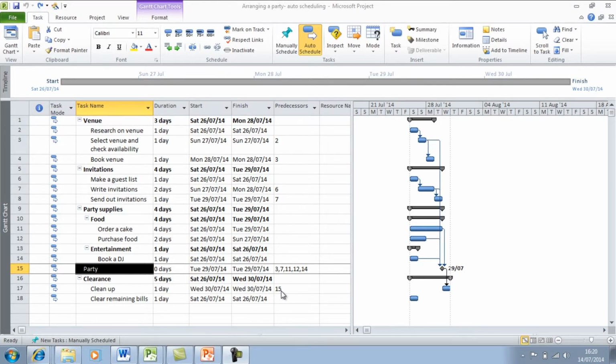There's a flexible constraint, which is where Project can change the start and end date of tasks. There's inflexible constraints, where a task must start and finish on a particular date. Or there's a semi-flexible constraint, where a project defines a start and finish date boundary.